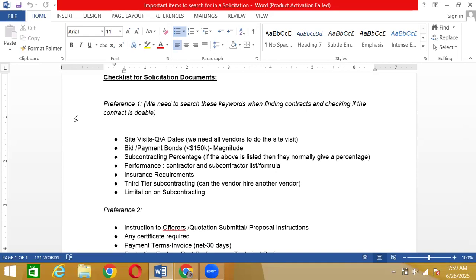Second, they say that the site visit is encouraged, but you are still eligible to submit the proposal and everything. In that case, it is not mandatory, but we as KSNO have made it mandatory for our vendors to go to the site visits to understand what the work is because we discuss firm fixed price.